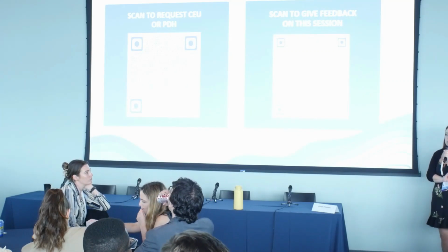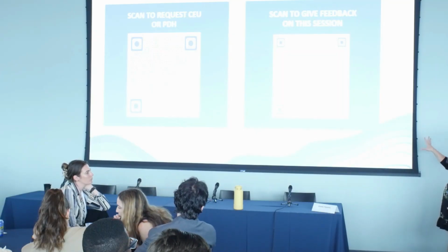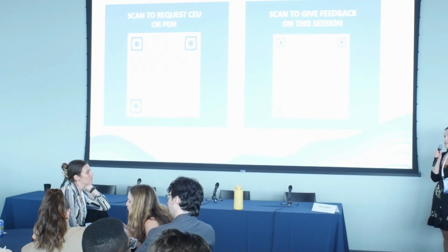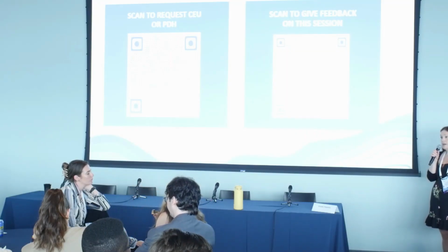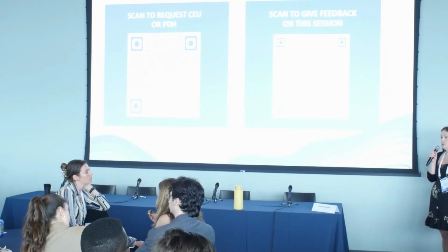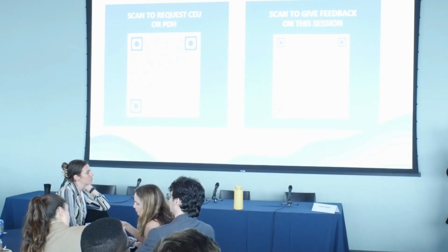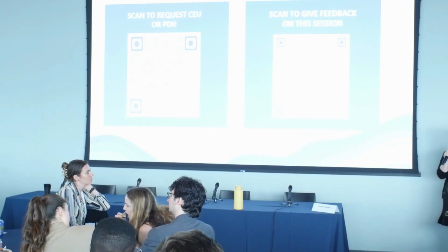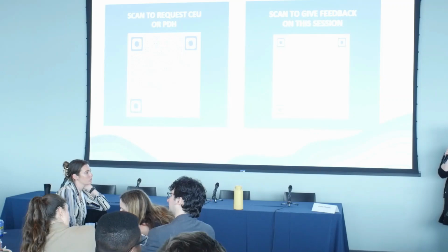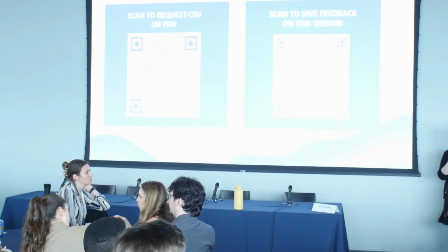No, that's a great question. There is a significant drainage infrastructure that was put in place as part of this project, which I probably should have mentioned. Not just a cistern, but we did replace tide gates. We do have a near-surface isolation system that runs up Route 9A, which is basically pressure-proofing manholes that helps prevent water from backdooring into other parts of the neighborhood. So there is a full drainage system that we worked really closely with city DEP on, and we continue to work with them as that is getting built out and we're in construction.